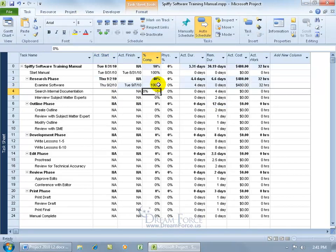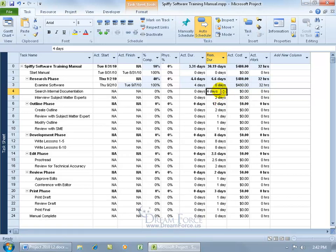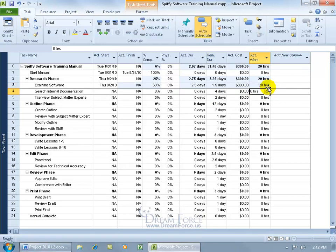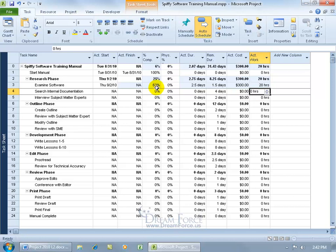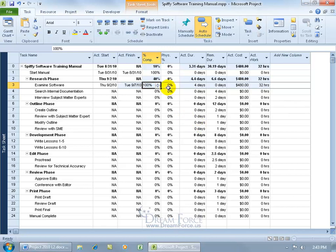Let me go ahead and change this to 100%, and there we go. And you want to keep an eye on this, that you want to make sure that what you enter in here reflects the desired changes you want to see over here. That's one thing to keep in mind, especially if you forgot about the remaining duration field. You can also mess with the hours over here, and let's go down to 20 hours and hit enter. Notice that the actual work, what we type in here, reflects the percent complete. Because we reduce the hours, it says, okay, 63% is complete. So you've got the formulas going back and forth between these cells. What you select here for complete will reflect the work and the work vice versa for percentage here. And then type in 100, and we've completed that task. And then of the task summary for these subtasks here, you can see 40% overall has been completed with this task being completed. And we've got the actual duration of 4.4 days.